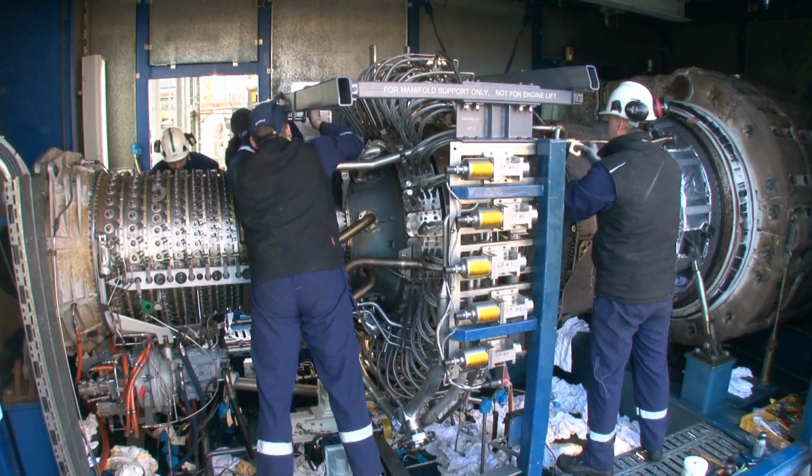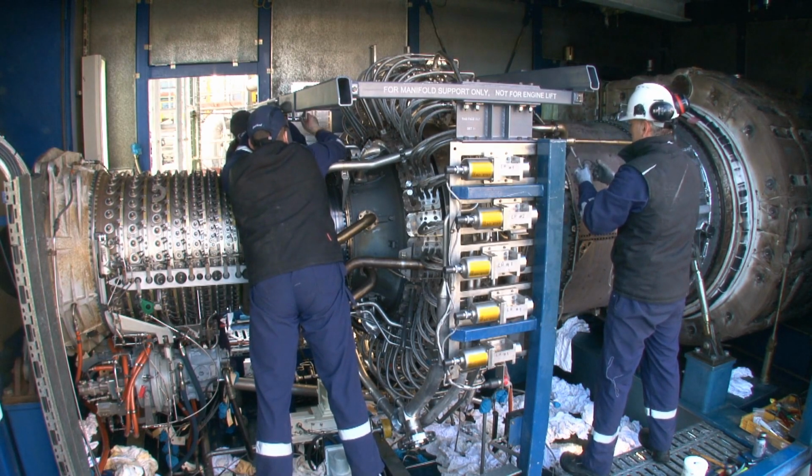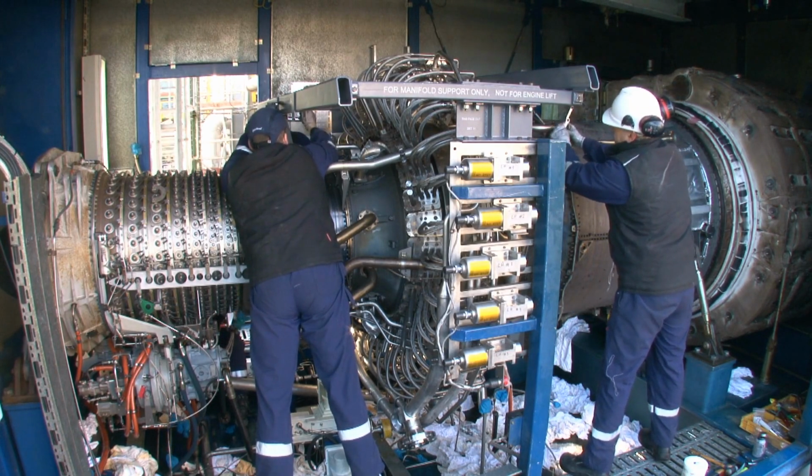Boundary isolations need to be maintained so that all adjacent groups remain safe. And this is when all the details start to matter. A small missing setting or one missing conductor can halt commissioning until the deficiency is addressed. This can get overlooked, since everyone has been focused on the big items they can touch and feel on site and may not even be aware of the impact of the missing or incorrect setting.